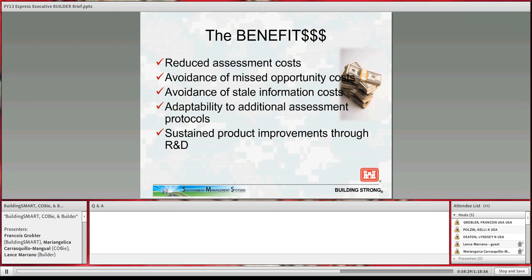So in the traditional approach, yeah, they may make a decision to go ahead and say this needs work, but they don't get to it because of priorities for 3 more years. Well, they've got to send an assessor back out to rescope that project because the data that they collected originally is a single point in time. It doesn't have any sort of predictive capability.